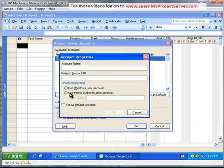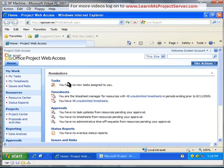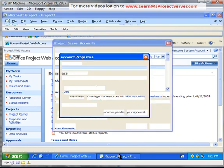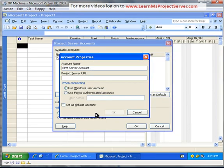Here, you need to provide an account name. Let's say, EPM Server Account, and provide a Project Server URL. In our case, this is HTTP colon slash slash EPM Server slash PWA. So let's go ahead and type it up. HTTP colon slash slash EPM Server, this is our name, slash PWA. This is the instance of the Project Server that you're connecting to, so you have to be really specific that you provide the Project Server instance.